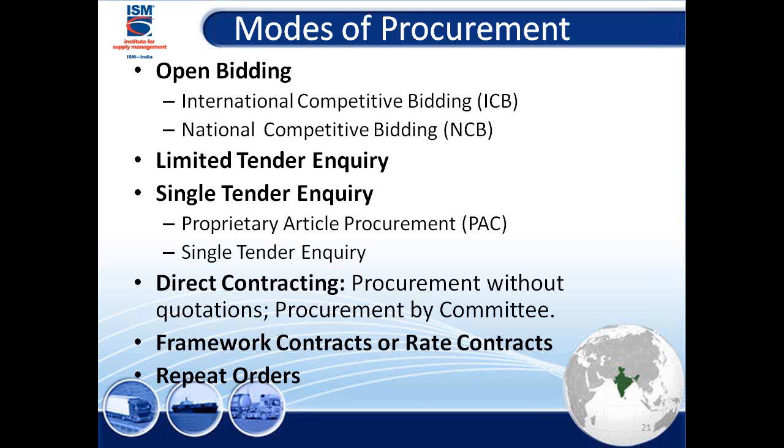Limited tender inquiry. Limited means I'm going to limited tenders. I'm sending only to qualified suppliers. Single tender means basically no competition. Single sourcing. It's for proprietary items. Nobody else makes it. There's only one supplier who makes it. So that's the situation with proprietary items, it is a single tender. Now, that single tender inquiry, I will explain furthermore.